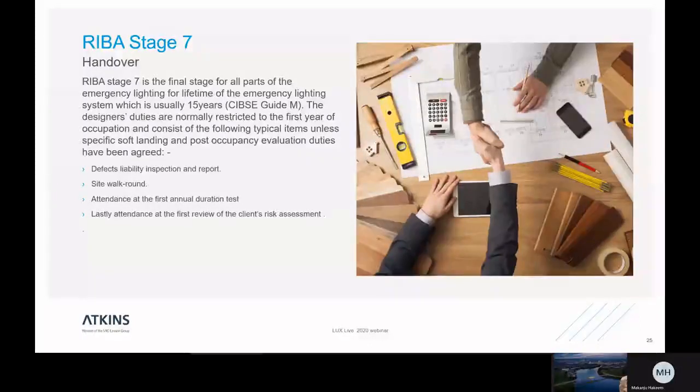And this is absolutely part of the final sign off of a job, which will be at the end of the liquidated and ascertained damages period, and should be thought of as being something that needs to be done. And you can be sure, if you are the designer, that's when you are signing off your design fully, and you should be walking away at that point, not when you hand over the building.